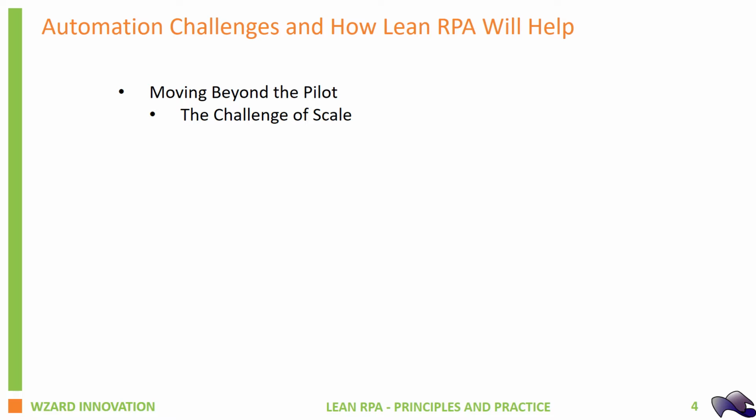There's a second challenge that we encounter, which is organisations that haven't fully evaluated their vendor prior to operating, and they've found the vendor to be perfectly fit for the pilot, but then struggled to be able to afford the costs of scaling. And this is one of the challenges of simply jumping in to the vendor without considering your own business needs, and the fit with the business and skills that you have available.